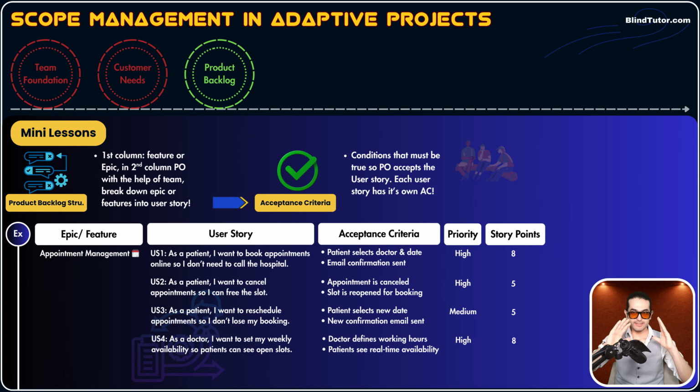So DOD applies to all user stories and it's a checklist. We check if this user story has been reviewed, tested, and then deployed. And once they are done, we go and see if they meet the acceptance criteria or not. Now acceptance criteria zoom in on each user story. And another difference, guys: the DOD checklist is made by the development team.